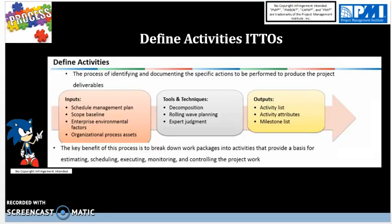For tools, we have decomposition. Each work category and subcategory within the WBS is decomposed into work packages, which are the lowest level of the WBS. A precursor to a work package is a planning package, where we have known work content but no detailed schedule activities. Decomposition involves team members in the process and can lead to a better and more accurate result in estimation.